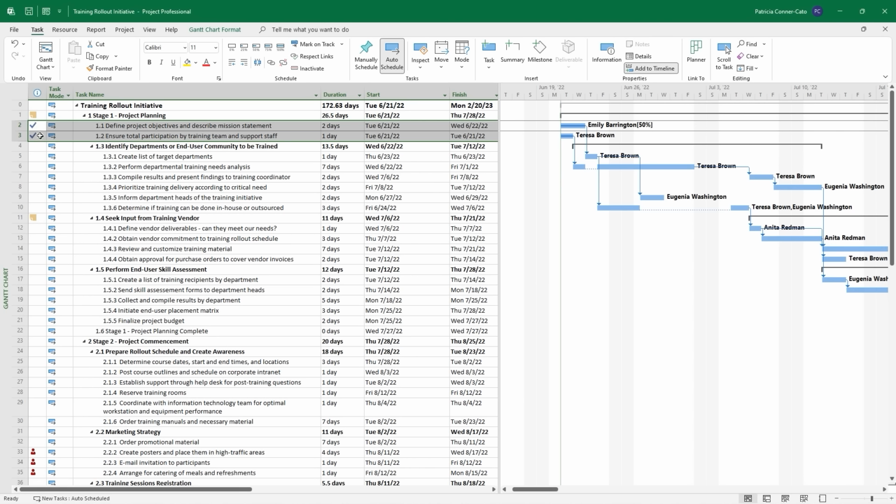First, the indicator column now has a check mark for each of those tasks. And if you hover over the check mark, it will let you know the date that the task was completed on. On your Gantt chart, if you look at the Gantt bars for those two tasks, they have a thin blue line going all the way through them, which indicates 100% complete. Even with a 25% completion, anything above 0, you'll see a thin blue line in the Gantt bar.